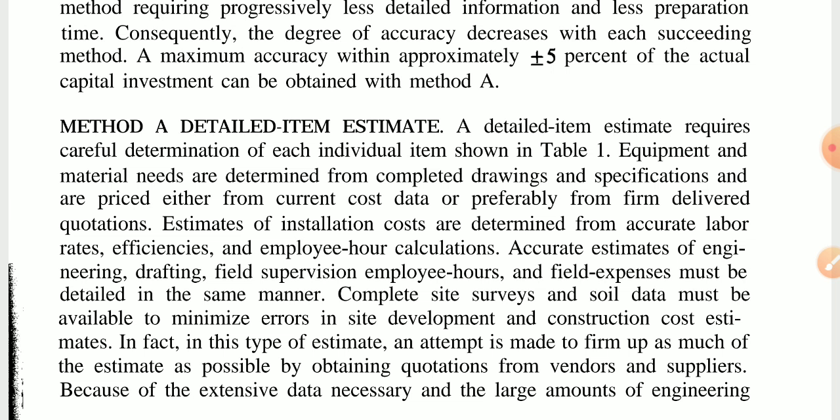in site development and construction cost estimates. In fact, in this type of estimate, an attempt is made to firm up as much of the estimate as possible by obtaining quotations from vendors and suppliers.